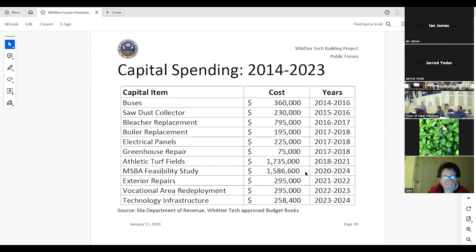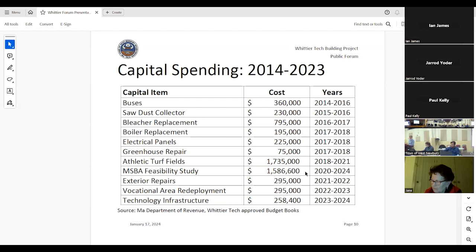I just bring that up because it happened with Pentucket, so that's fresh in my mind as a potential change order. That's why I'm wondering, for this 440-some-odd million school, if we haven't done any subsurface investigations to understand that. We had sinkholes and everything else under the Pentucket school, so there were some pretty significant issues that we had to overcome in the design process and the costing for the school. So I'm hoping that all of that was completed, and if we don't know, we should find that out, because this $440 million could be a significant overkill or underestimated.